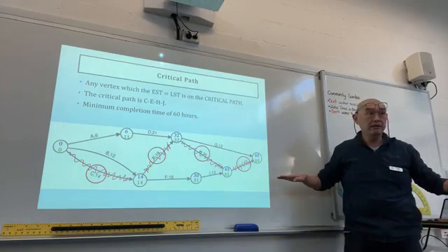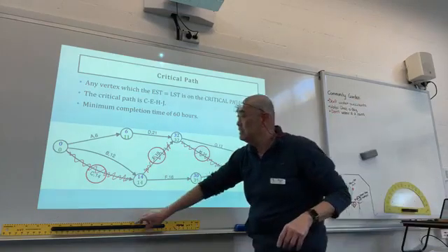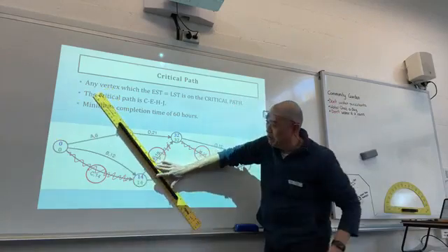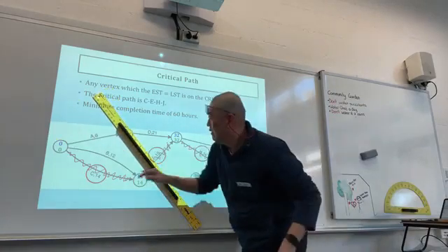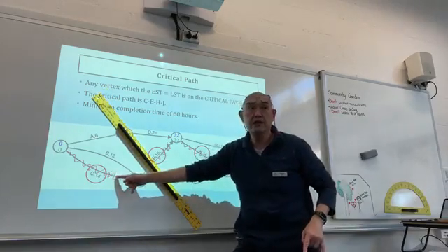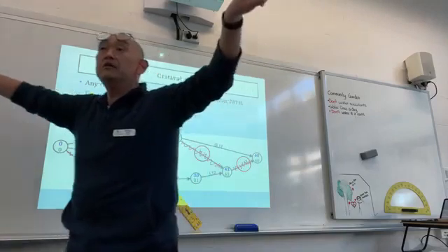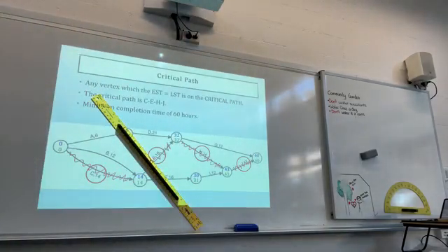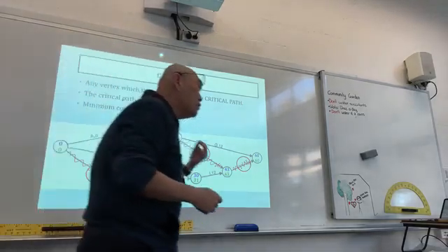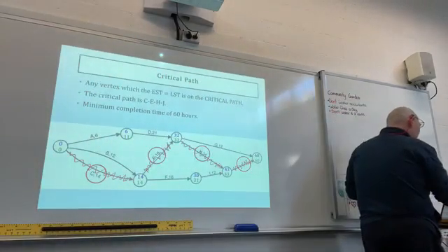See that? So you can see, just take the most straightforward example, which is before E and F can start, you have to finish C first. Because C is 14 hours, B is 12 hours. So you actually have a little bit of movement, the 2 hours that you can move. Correct? Yeah? So this is what the critical path is.